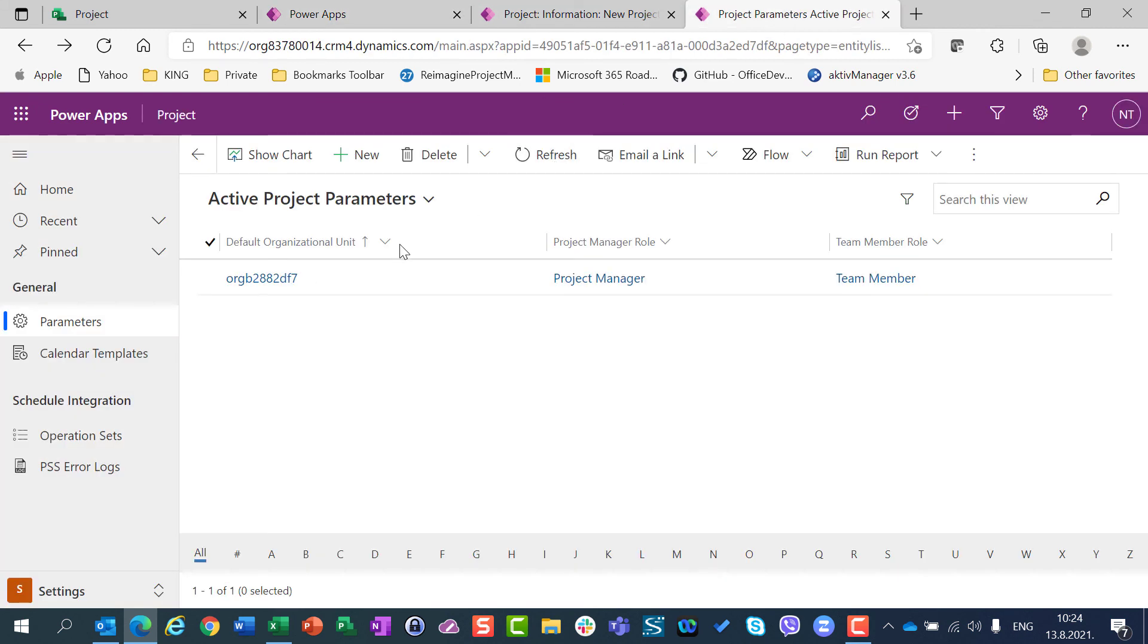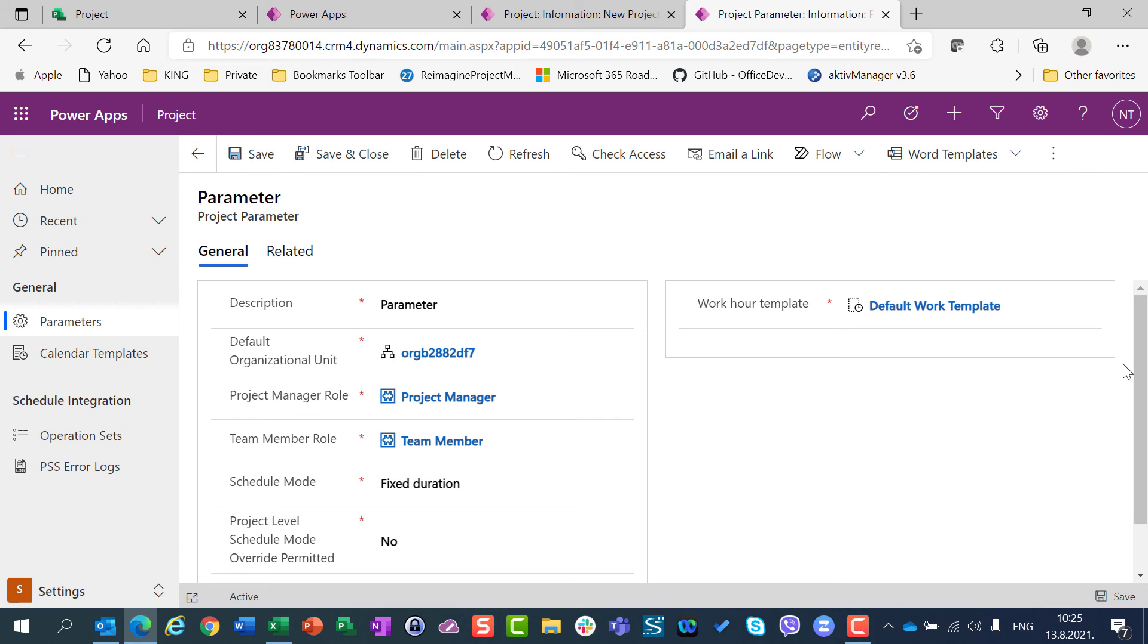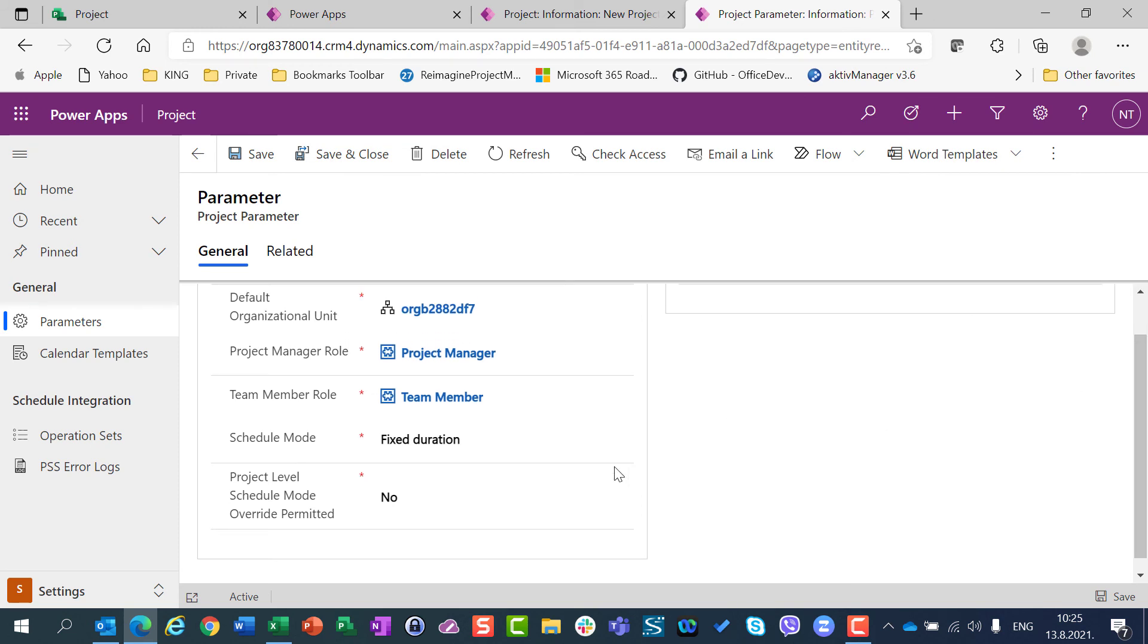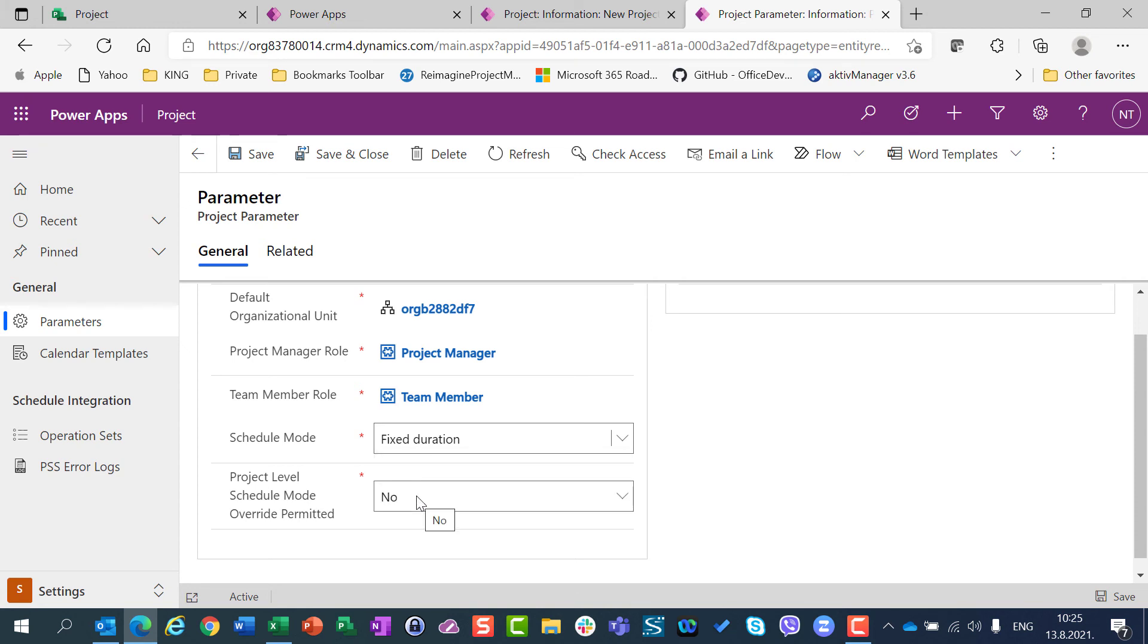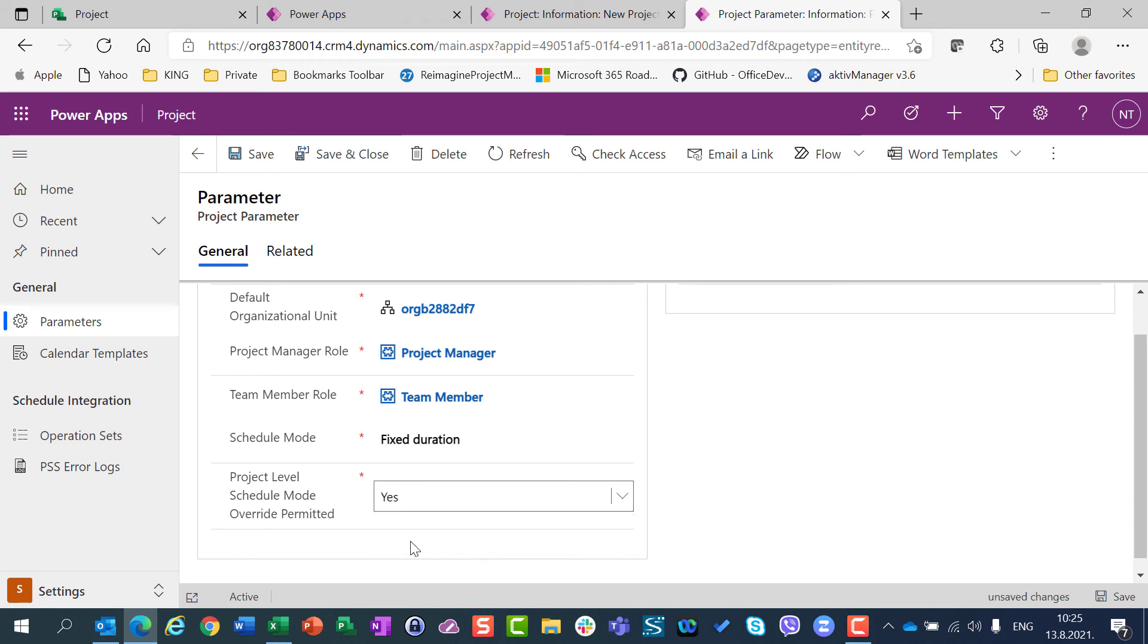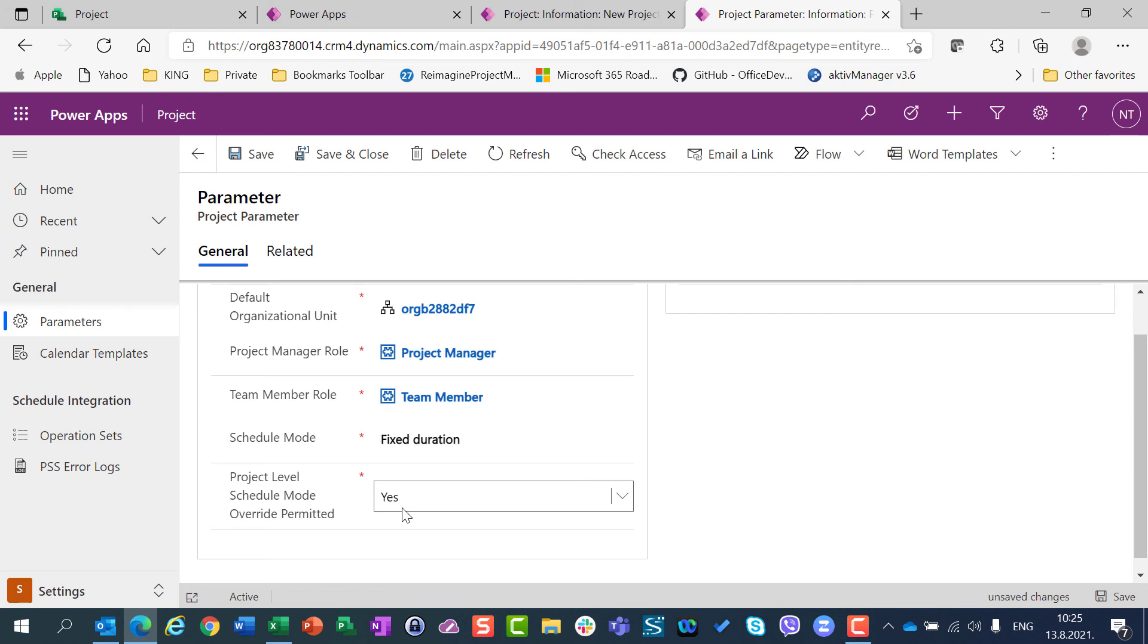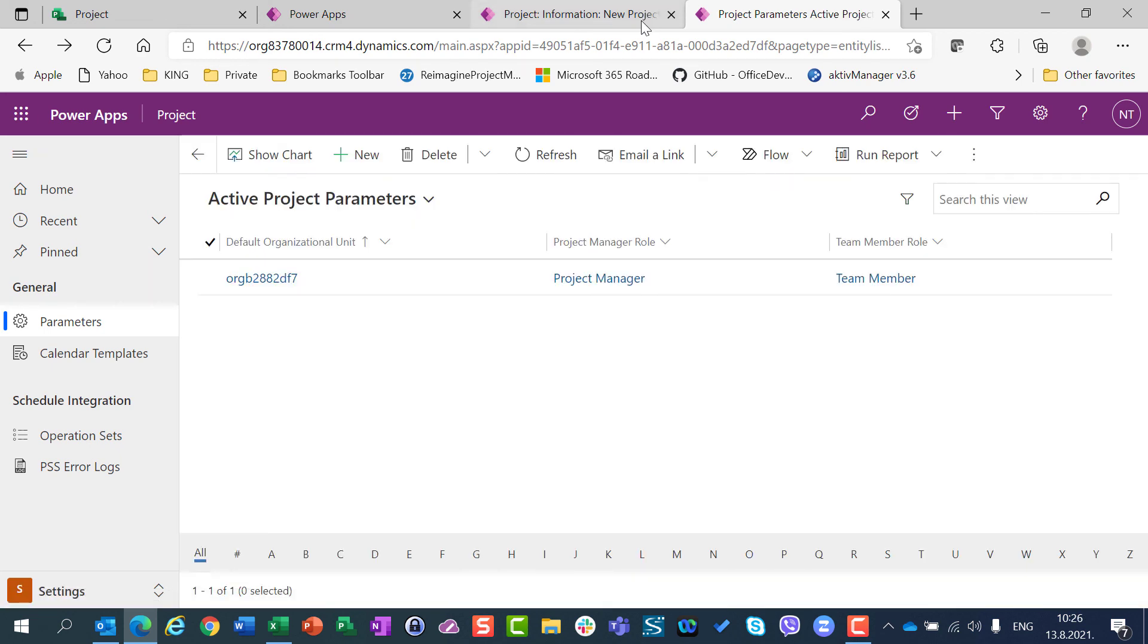Because here I chose that in Setup. Obviously, you will have a project with different Schedule type modes. I strongly recommend that you here put the most often Schedule mode which you will use, let's say fixed duration, it can be whatever you want, and to put here yes. In that case, as I told you, you will be able to have some projects which are not with Schedule mode which is by default created, but you will be able to change them. So I will use, in my next videos, fixed duration as a Schedule mode by default, and I will allow that on Project Level I can change that Schedule mode. So I am going to close it.